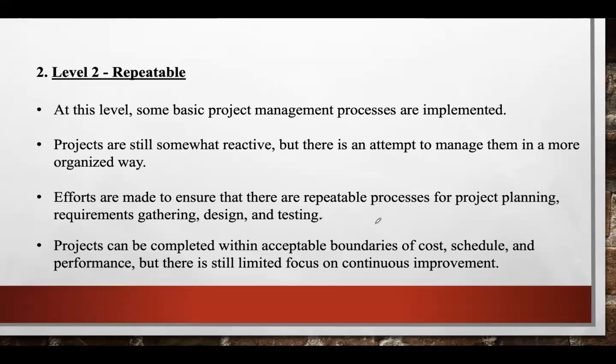The next level is the Repeatable level, where the focus is on basic project management processes such as managing schedules, cost, etc. Level 2 does not concentrate on technical processes, as these were not addressed at level 1 due to complexity. Instead, the Repeatable level only focuses on basic management processes, making efforts to ensure repeatable processes for planning, requirement gathering, design, and testing. The success rate of project management becomes higher because improvement processes have been recorded based on successful results of previous similar projects.